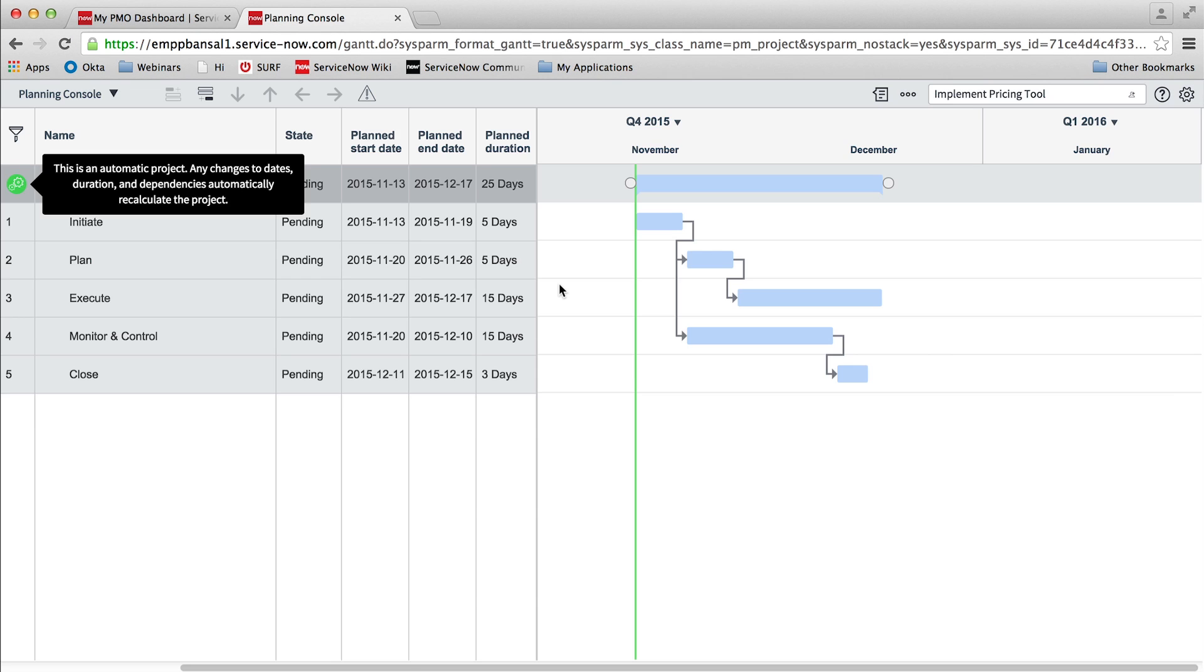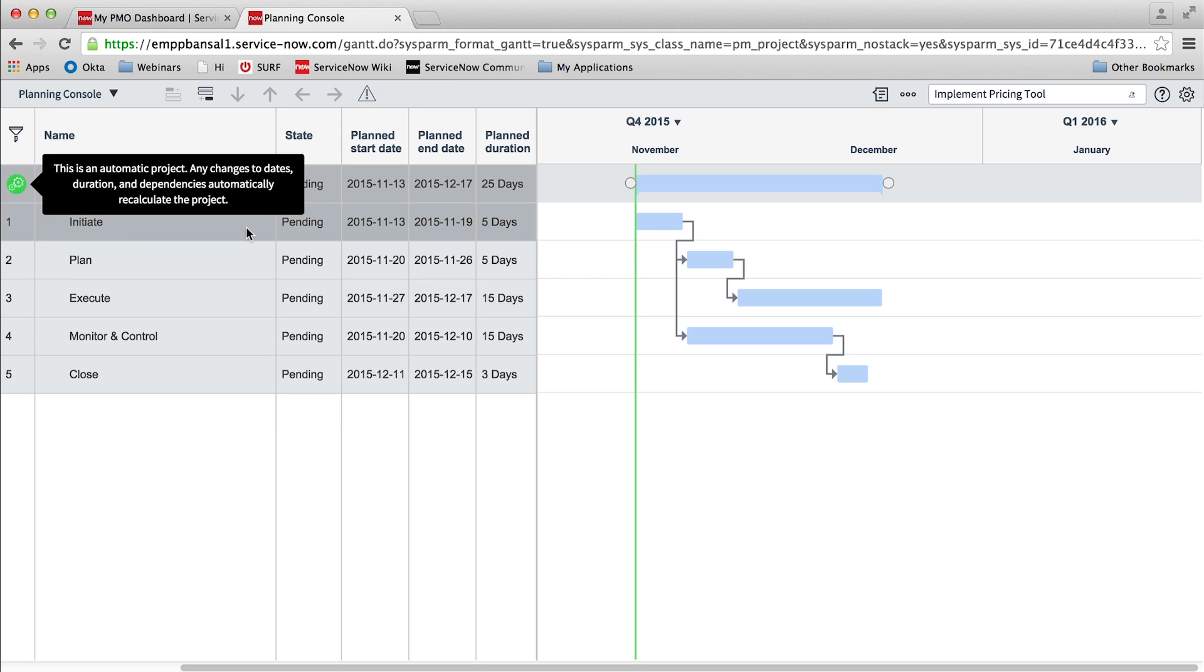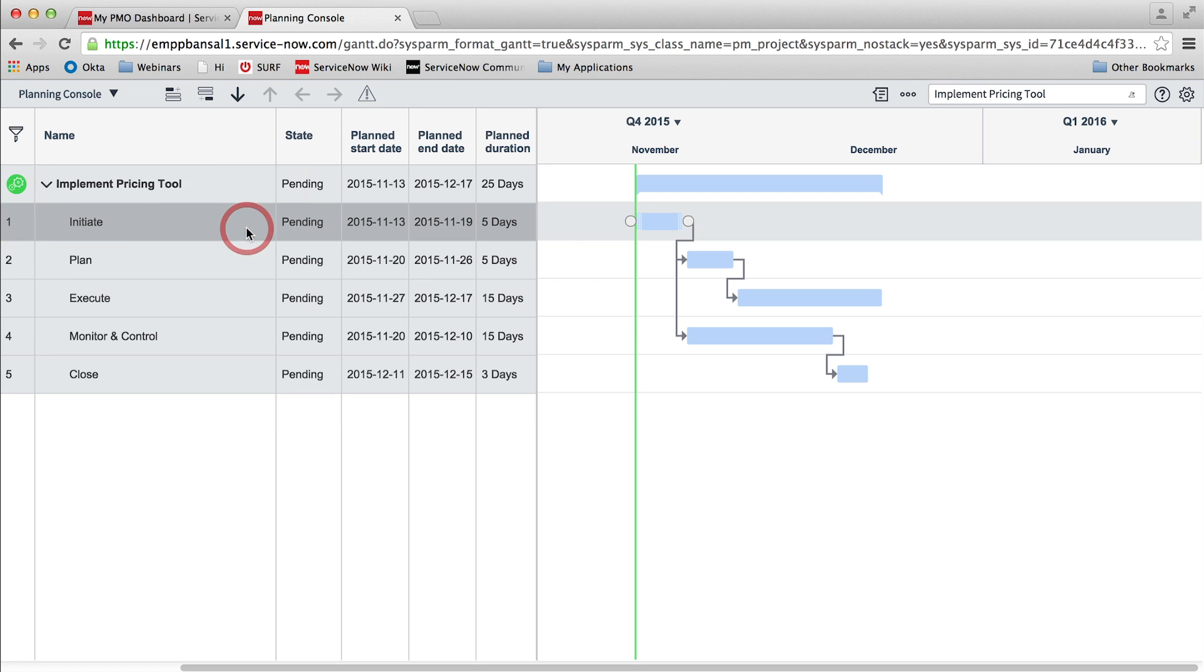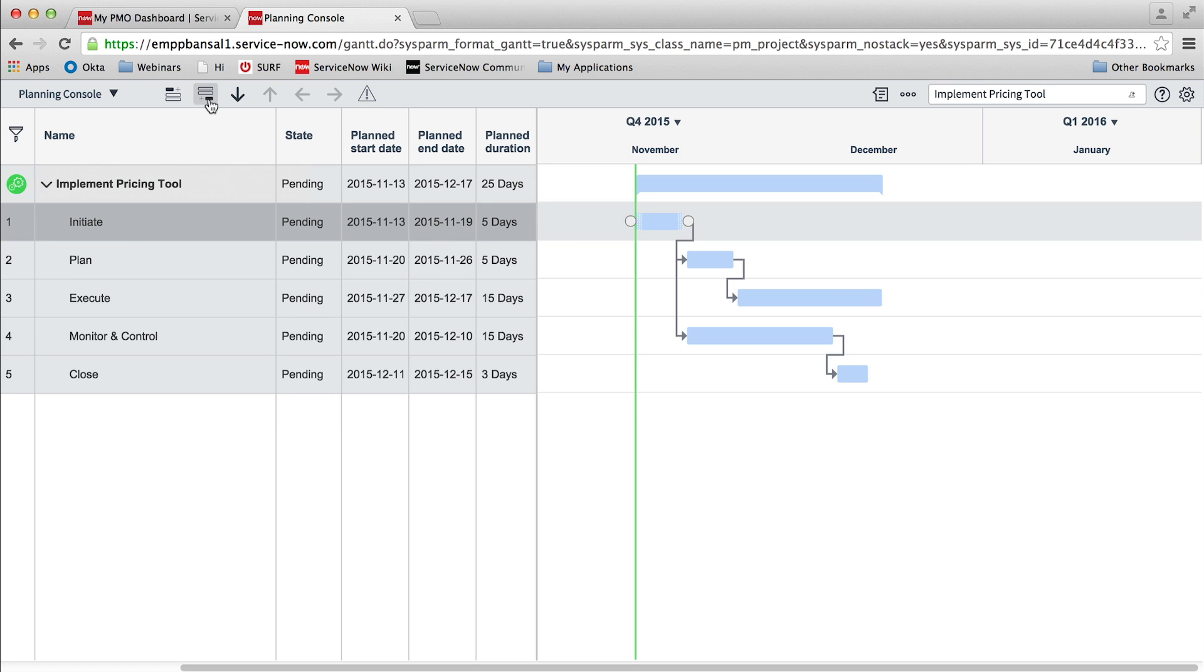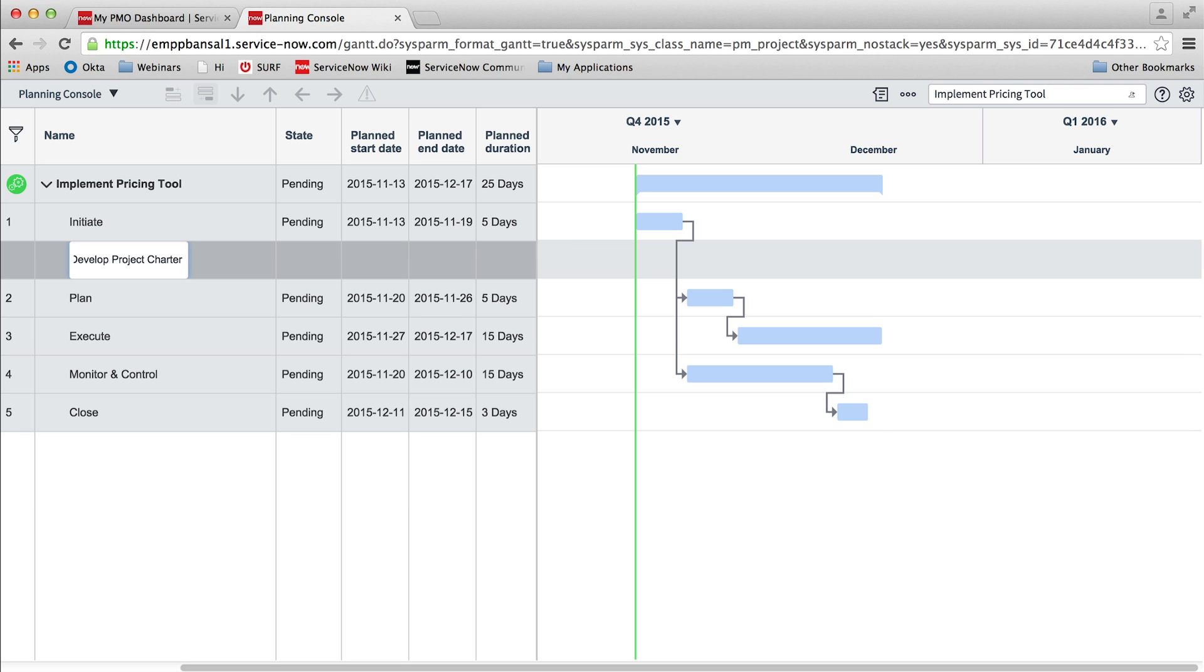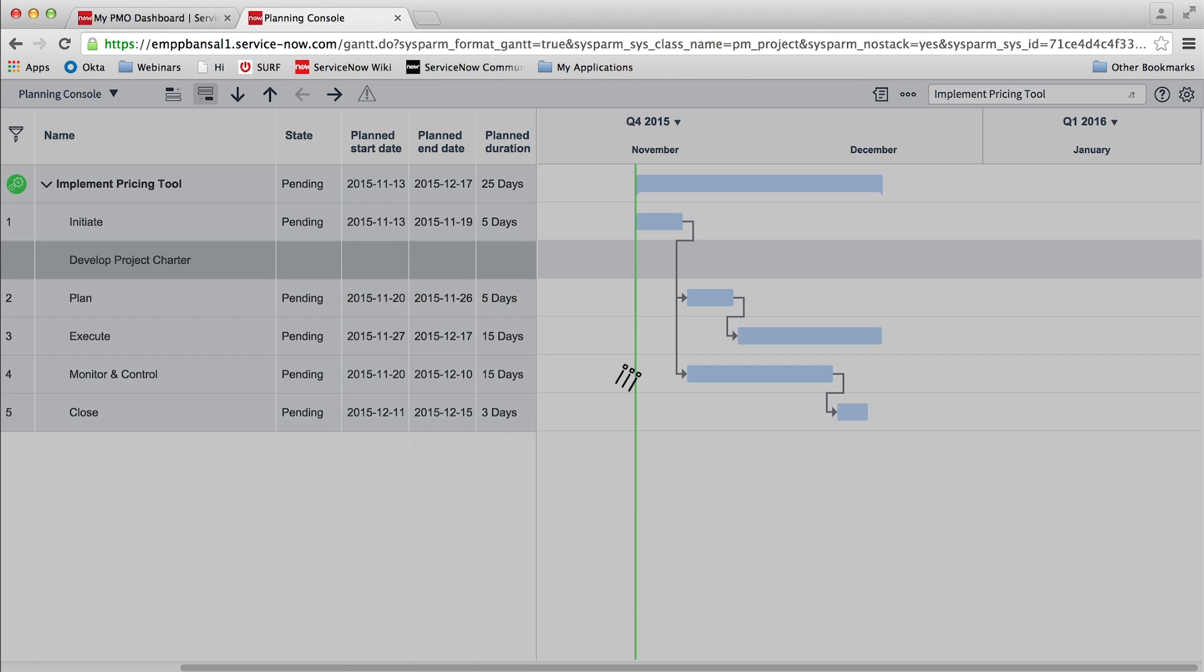As we see, when a new project with standard project phases gets created, project managers can now define the work breakdown structure based on their project requirements. The planning console supports creating a hierarchical work breakdown structure, and it can be nested to any level depending upon the project requirements.